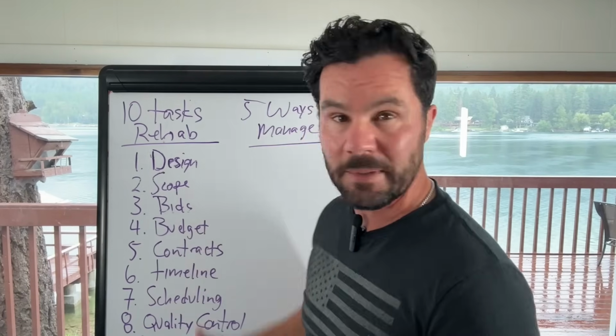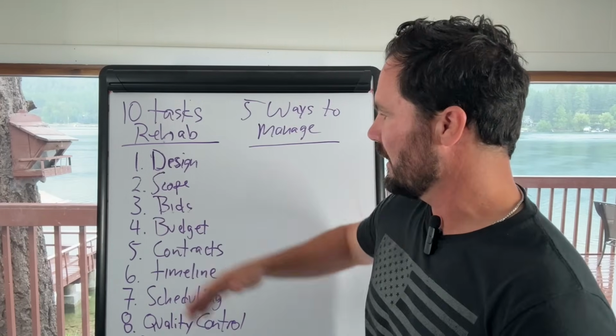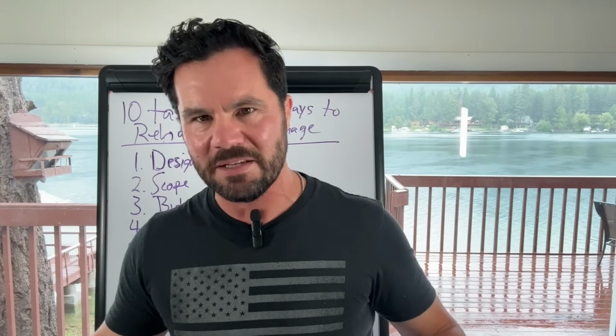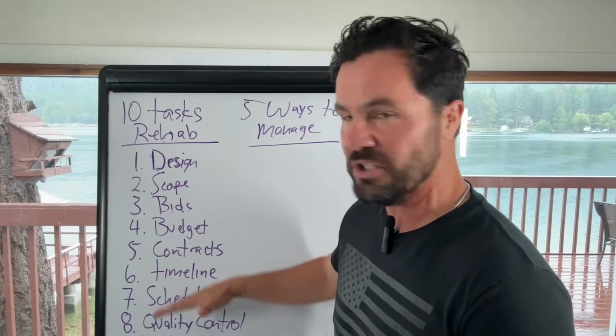We usually have a preliminary budget when we buy a property or when we estimate repairs to do a deal, but you don't actually know the real budget until you get hard bids. So that's when we're going to finalize our budget. We're going to bring all the pieces together, and we might have to adjust there. We might have to say, you know what, maybe we go with cheaper doors. Maybe we keep the existing base instead of new base and we just paint it. You're going to have to make adjustments based on where your final budget comes in.